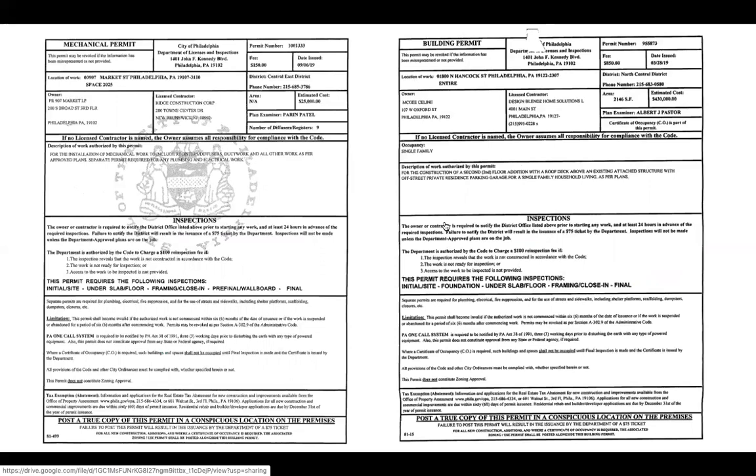So that's why you see here a mechanical permit and a building permit. Because say someone comes to us, they just need a mechanical scope, and we use a building permit to apply and get a mechanical permit. But say they have structural, architectural, design, this, that, and mechanical, it can all go on the same permit application, but then we're gonna get a building permit and mechanical permit, 2 separate permits, 2 separate payments. Make sense?